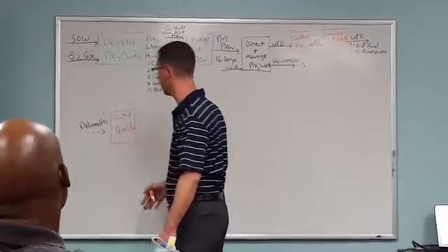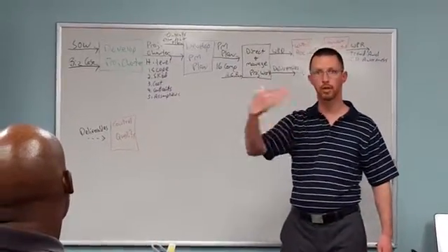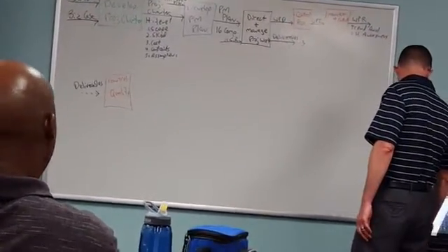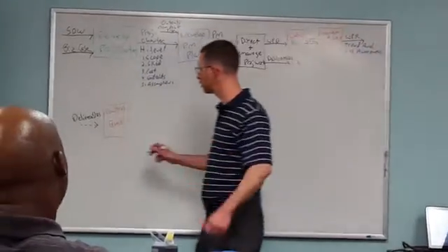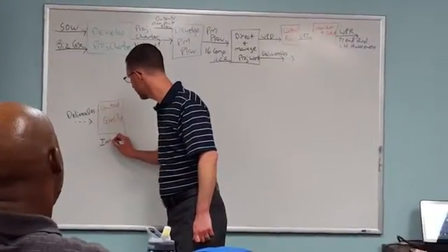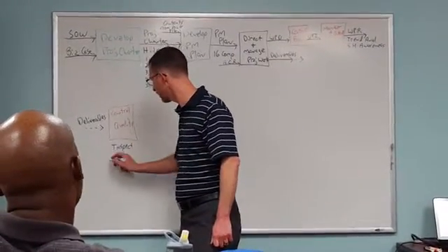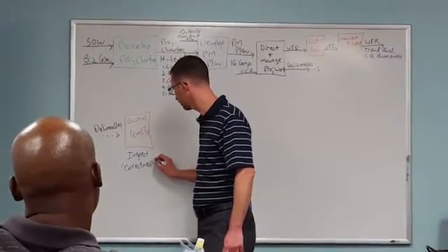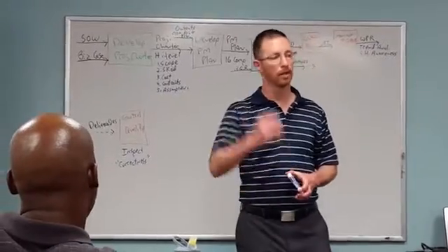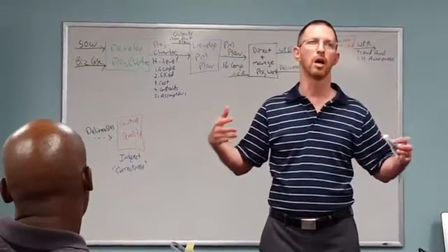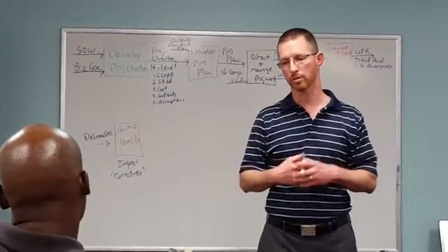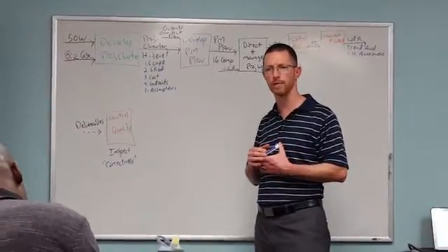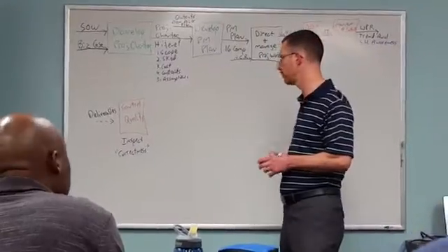So we didn't talk about this during integration management, but putting it on a flow chart is going to help you connect the dots on what actually happens on a project here. So during control quality, I'm going to look at every deliverable item, and I'm going to inspect it. So that's going to be the major tool that I use here. And as I inspect it, I'm going to inspect it for something called correctness. So inspecting for correctness means that the deliverable item I created meets the quality metrics. I'm making sure it meets all the quality metrics that I've decided, and I know this is exactly what we should have created.